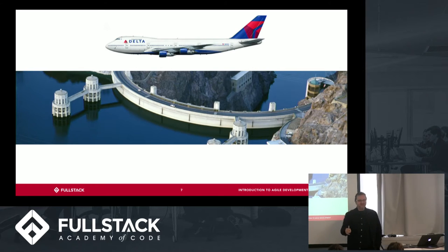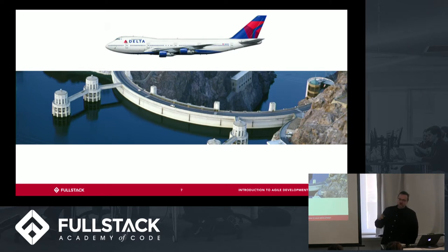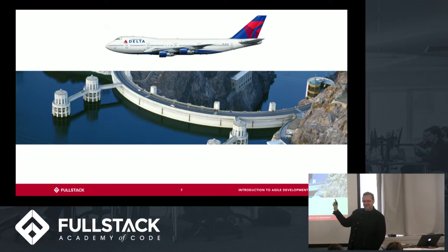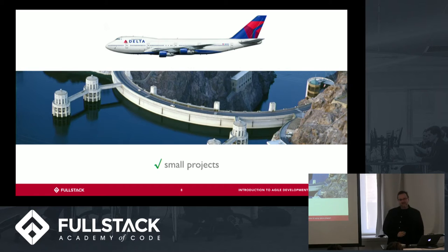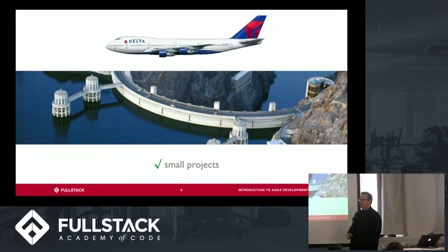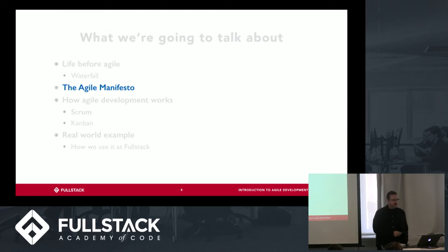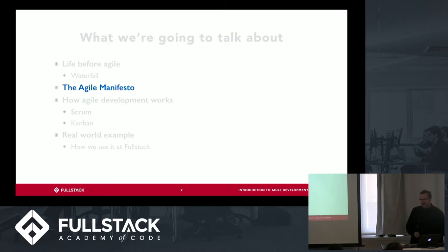But when you're dealing with humans, people who are using your product, the requirements will change because you'll put it in front of them, you'll iterate. So unless you're building something big like this, you're probably not going to want to use waterfall. Unless, one other example when it could work, is if you're working on a very small project, something that's 2, 3, 4 weeks, then you can use waterfall. That's fine.